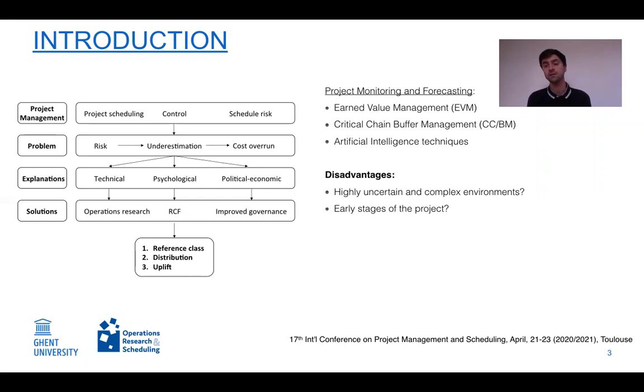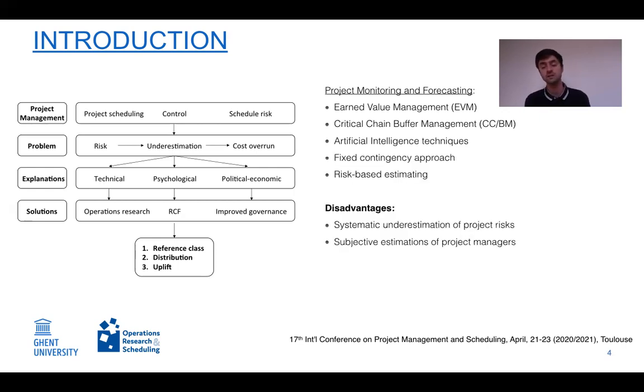However, the disadvantage of these techniques is that their outcome is sometimes questionable in highly uncertain, risky and complex environments, and that their performance might not be that good in the early stages of the project, simply because not enough data is available at that point in time. Therefore, other techniques such as the fixed contingency approach and risk-based estimating have been developed. However, they do not take into account the systematic underestimation of project risks.